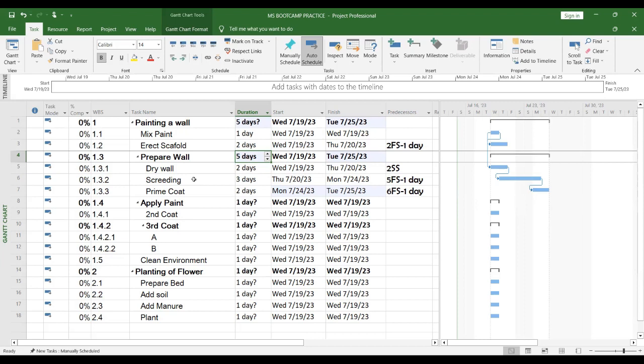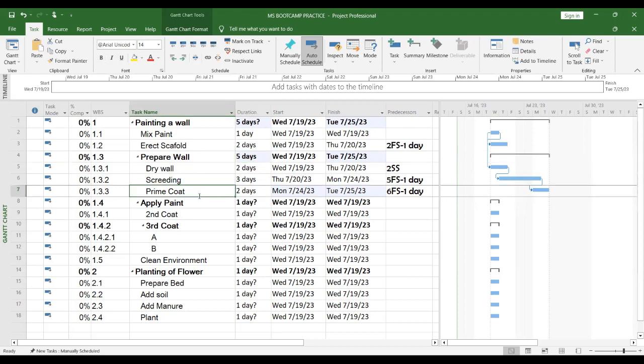So you can start screening that part of the wall before you get to the other side. On the second day it has also dried. Then the side you started screening first, you can start priming there. So as a project manager, you can study your weather, study everything, go back and apply your leads properly and fast track your project. So I'm happy that this is practical enough.